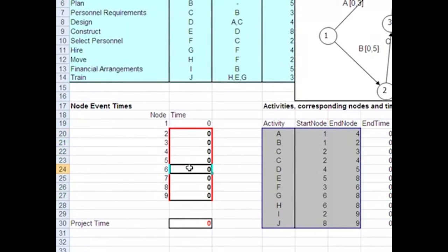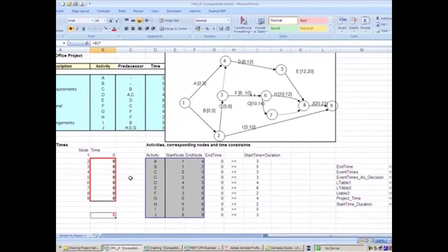At the starting point, for the decision variables, we can set all node times to be 0, which means all earliest starting times and all earliest finishing times for these different activities equal 0. And we want to use the Excel solver, the LP model, to tell us what our optimal solution should be, in which way we can find our critical path.